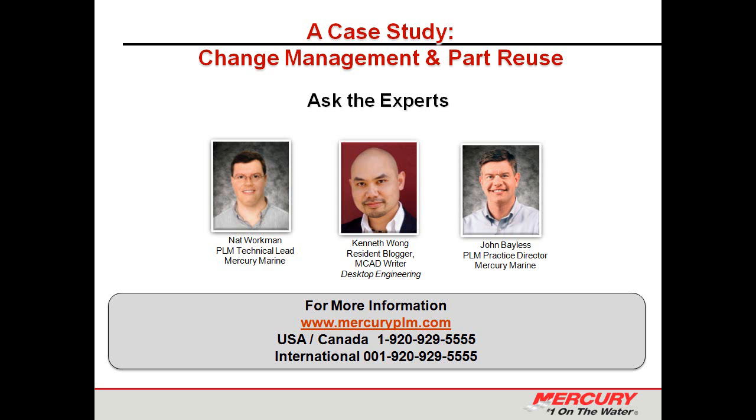Sure. Basically, like any large rollout, you're going to have some resistance from the user base. And so the key is to get ahead of that early. What we had was a change communication plan that we worked throughout the development of the change management system. At preset intervals or gates, throughout that 6 months when we were working with the business, and then the 3 months that we were configuring the solution, we knew we'd be going to the businesses and talking with them about the change coming, understanding what systems were going to be affected and how their job might change. That was one of the keys for us.